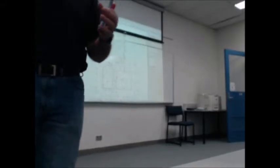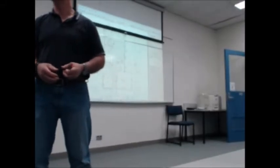Say I wanted to take out that. What do you call the corridor in front of the bar? Do I just measure it with my ruler, or do I get it from somewhere? No, just roughly. You haven't got a size for that one. Yeah. This is not to scale though, is it? Well, check it. It's not bad. It's close enough. Yeah, it's an estimate. You're putting 10% on. So it doesn't matter if you're a point out.